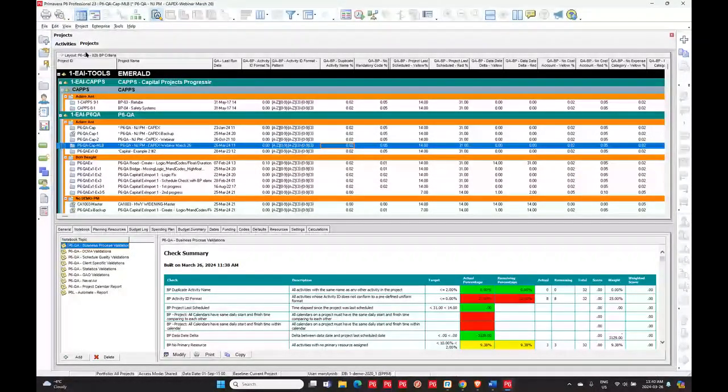When I go into business process criteria, this is something that I think might interest a lot of people. It does me, because I've dealt with a lot of schedules. I worked a lot of years with schedules for aircraft repair and overhaul of a large aircraft. Our activity IDs had specific breakdowns. Those breakdowns in those activity IDs generated monitoring reports. So if we got new activities added to our schedule with the wrong activity ID breakdown, guess what? They didn't show up on the right reports, and that never plays out well.